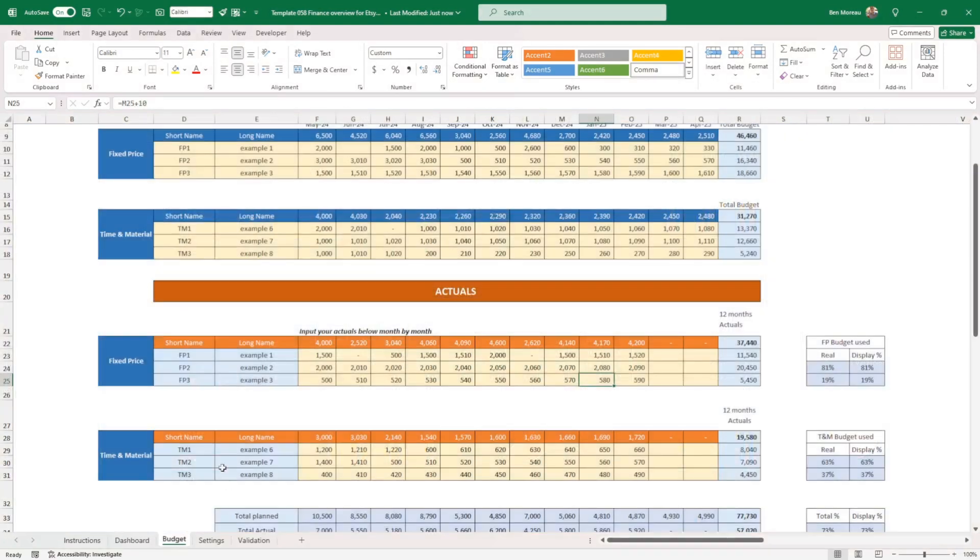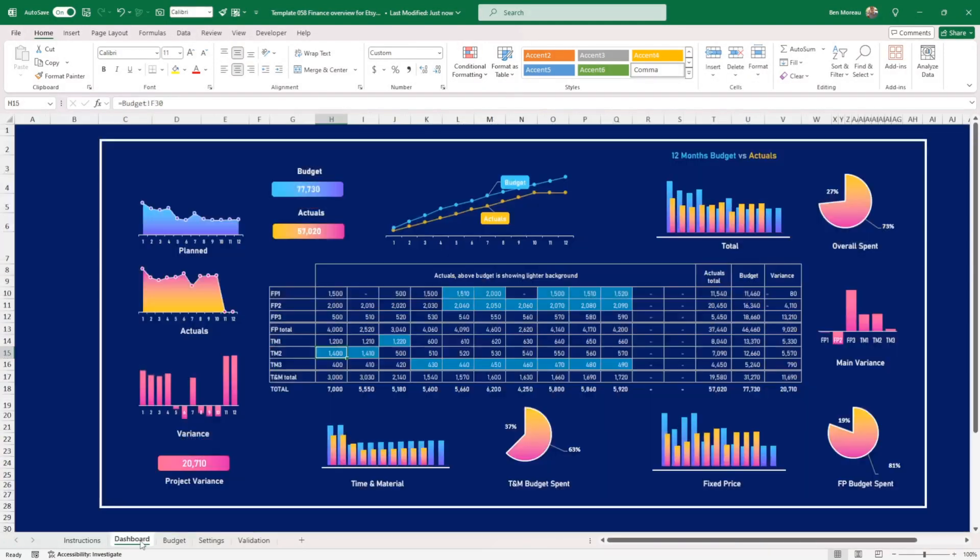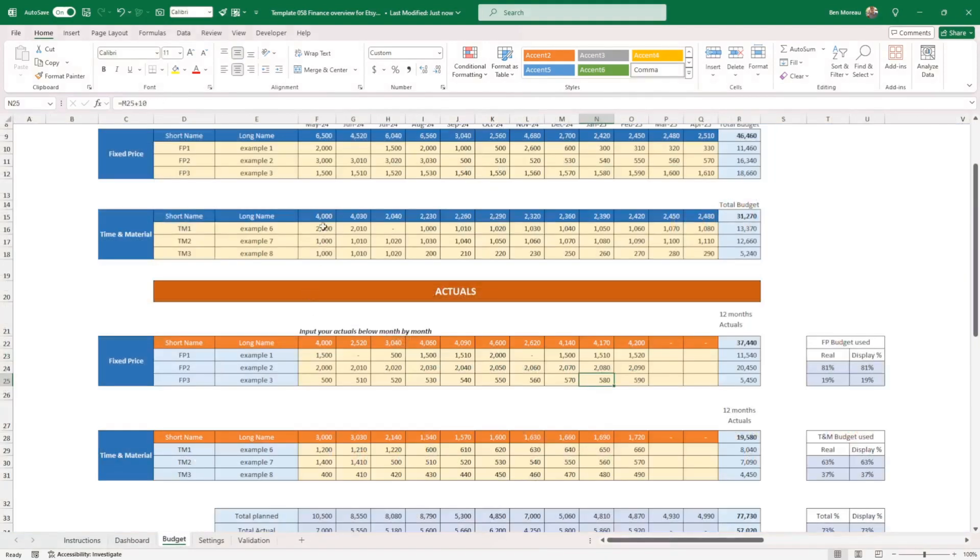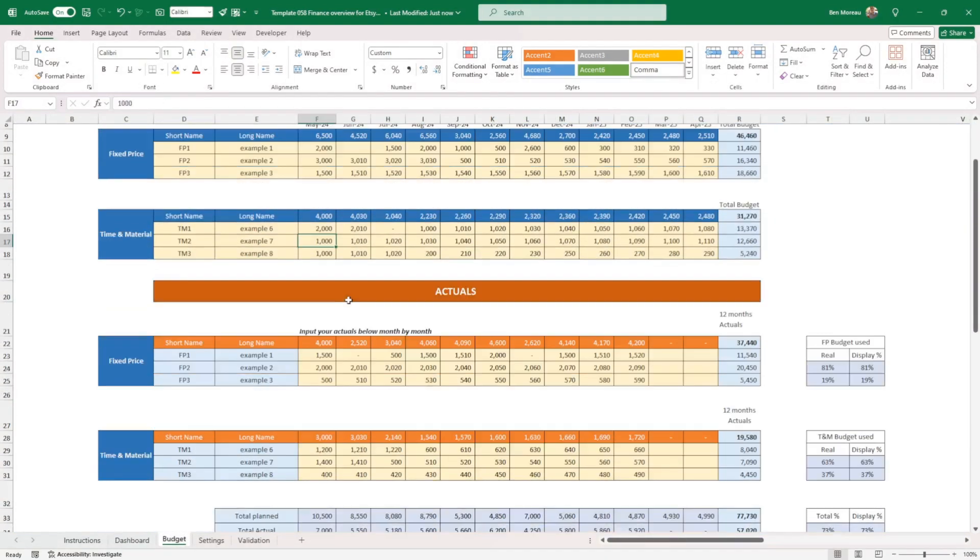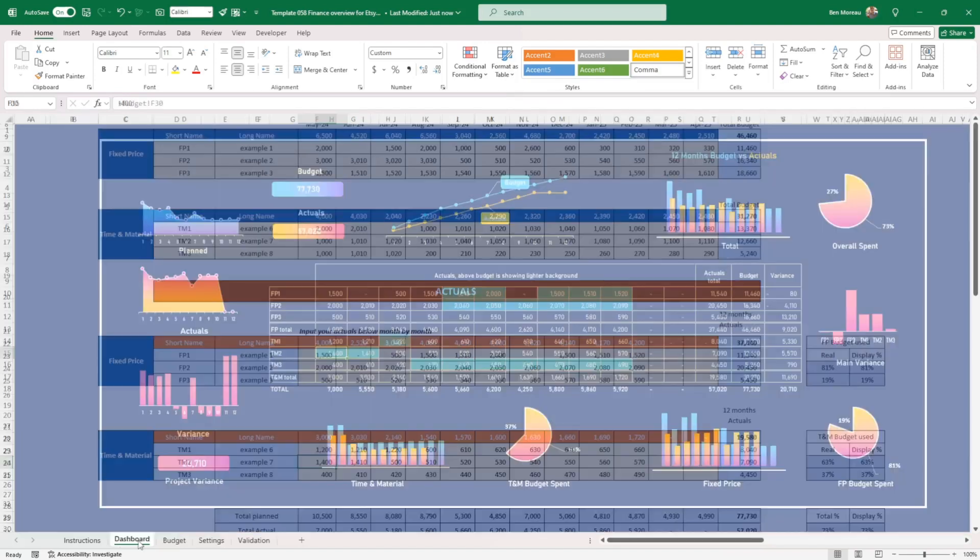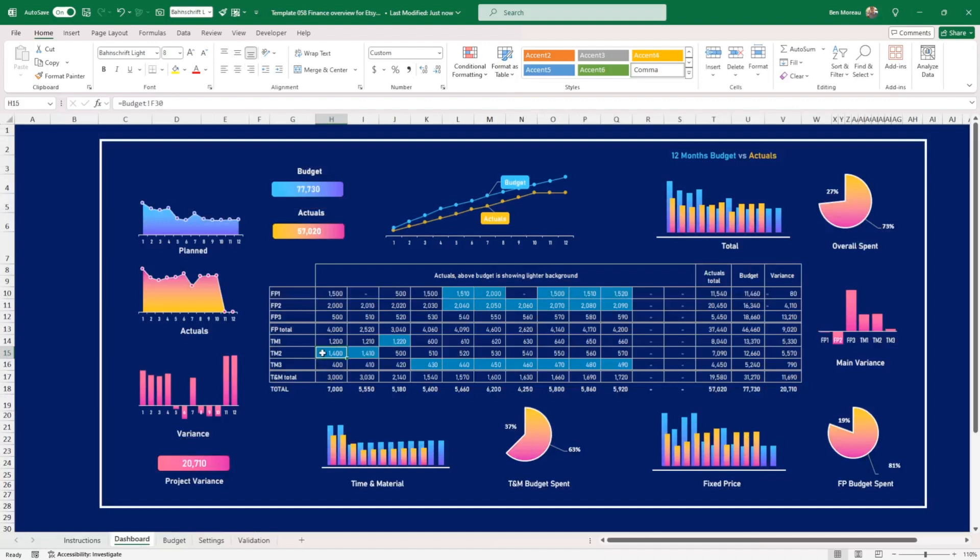I'm just going to demonstrate that to you. TM2 here, for the first month, we had a budget of 1000. And TM2, how much did we spend? 1400. So it works. We are above budget here for TM2. And that's pretty much it for the whole component here. There's plenty of over budget here, plenty of over budget here. That gives you a quick overview on the table.